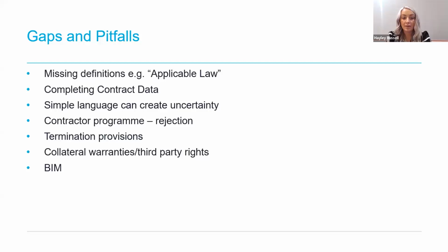In NEC3, there are no provisions for collateral warranties, nor are there any readily available drafted secondary option clauses to easily add this requirement. So, under the NEC3 contract, if the employer requires collateral warranties for a funder or tenant, then an additional Z clause needs to be drafted to include this provision and a suitable form. NEC4 has introduced secondary option clauses which provide for collateral warranties to be secured. However, they feature under the more international term of undertakings.